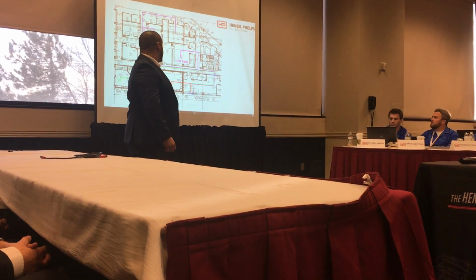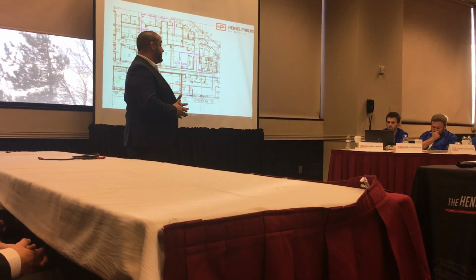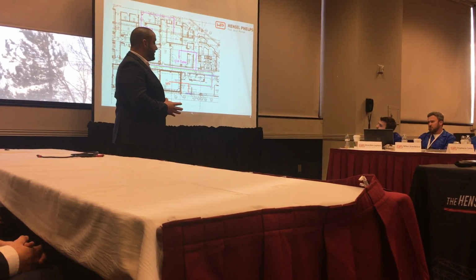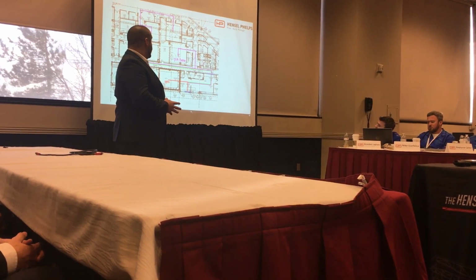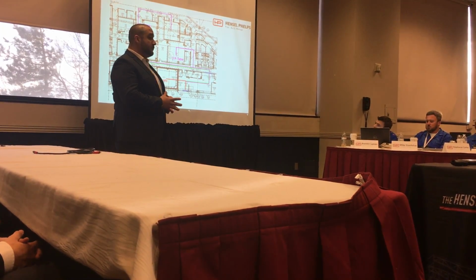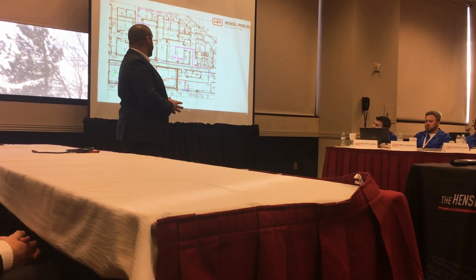Now moving into our plan to get these large, heavy MRI and CT scan machines into the building. Where the blue line is, that is where the exterior portion of the wall is going to be removed. We're going to utilize a 100-ton crane to lift it because the MRI machine itself is very heavy, especially the magnet portion of it. It's just over 13,000 pounds.